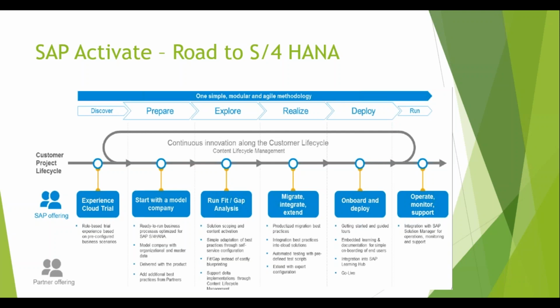Now, in SAP Activate, obviously there cannot be many changes. We are not saying this entire process has been changed. There are some steps which are eliminated. For example, initial preparation you cannot eliminate, because initial preparation means, from the project management point of view, getting the resources ready. Normally in initial preparation, we formally start a project, which is project kickoff. You finalize the team of consultants who are going to work on the project. You determine what resources will be required and make sure that before the business blueprinting phase starts, you have all the resources ready with the project plan. That is the initial preparation.